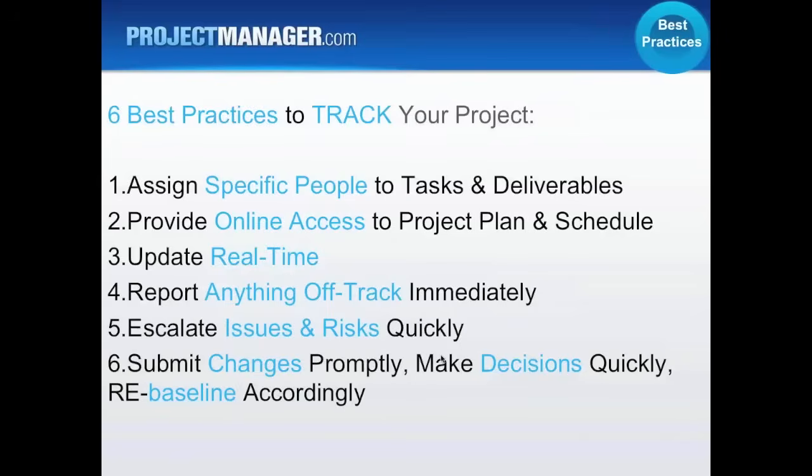And number 3, update things in real time. It's having all team members update things real time instead of waiting to the end where people have time or are catching up or thinking that's the last thing they need to do. Reinforcing with all the team members, people who are assigned to the project, who are working on the tasks and deliverables, really updating those real time. That helps other people to know when to expect things. As we look at the critical path and at dependencies, people know before the last minute that things may be late or if they're going to be even early. So it helps us all in planning.